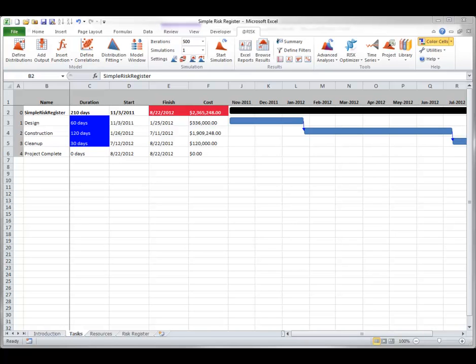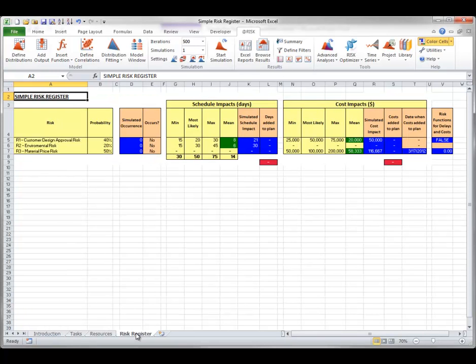At-Risk's Project tool allows you to build a risk register that can be included in a simulation of a project schedule. A risk register lists possible risk events that can impact a project schedule and its costs. Typically, each risk event has a probability of occurrence, so it either occurs or it doesn't. If the risk occurs, the size of the impact is typically also uncertain. You can open the Excel file Simple Risk Register from the At-Risk example files to learn about risk registers.